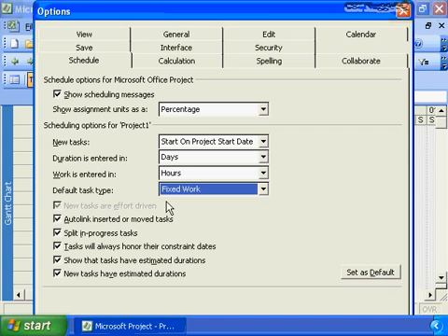In essence, that says the effort for this task, 16 hours, 24 hours, 36 hours, whatever the estimate for the task that you have defined in estimating is the actual work that will be required to complete the task. If you have 2 people on the task, it will be done twice as fast. If you have 4 people on the task, it will be done 4 times as fast. So the work is fixed, and the variability is the duration, and the variability for duration is based on the number of resources and the availability of resources for your project.